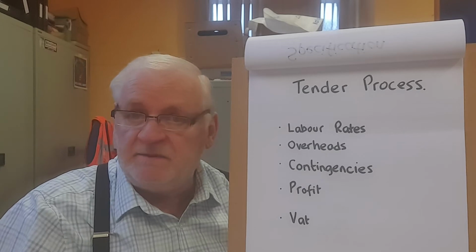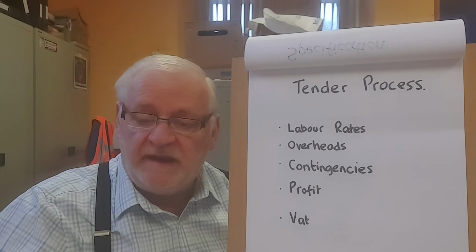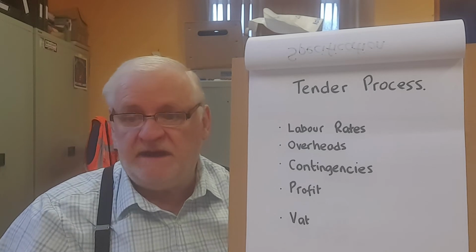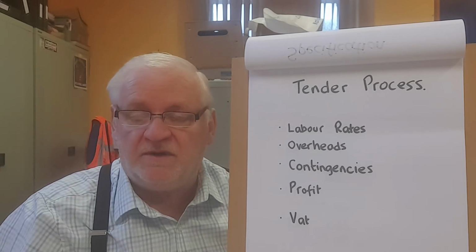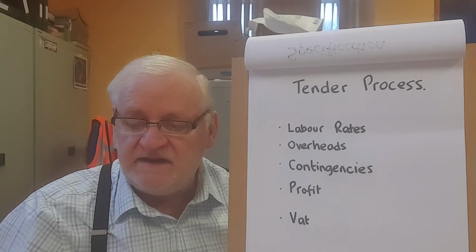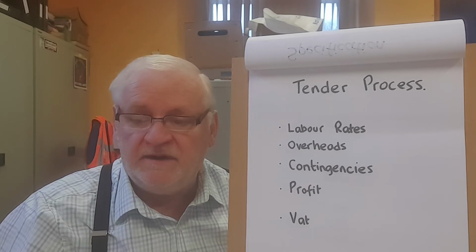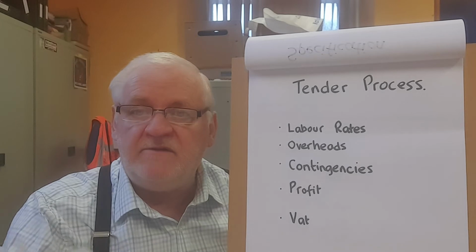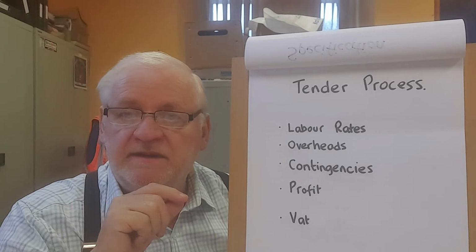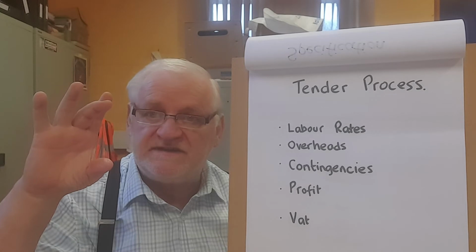And with experience and with time, you'll be able to develop quite an accurate way of knowing how much you should be charging. Now, there are other ways of estimating costs. You might buy the SPONS book, or you might buy Laxton's Building Price book, okay, the NRM book. And all of these books will allow you to be able to make very accurate predictions as to, if you go into the SPONS book, I've got a copy with me at the minute, it's a very, very thick book. It's measured by inches wide.